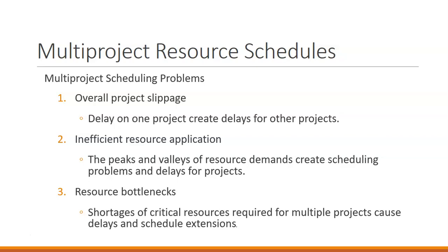So when we have multiple projects that are trying to use the same exact resource, we get time delays and we have to extend our schedule. The only other option of fixing a resource bottleneck without a time delay is to increase the number of resources we have at that bottleneck, whether we're able to hire more people with that skill set or buy extra equipment. If we're extremely financially limited, then we just have to find ways to get through the schedule issues with that resource bottleneck.